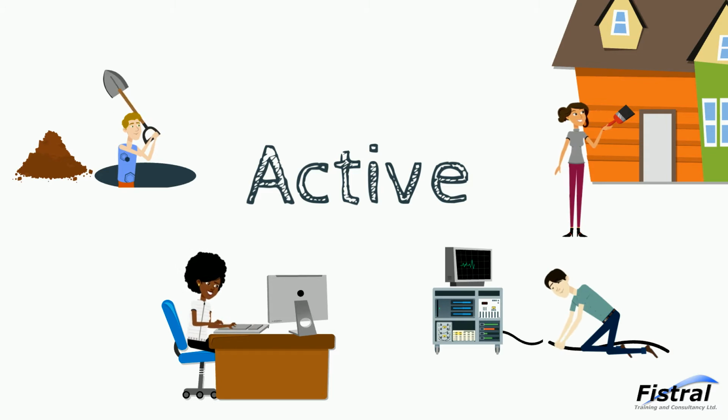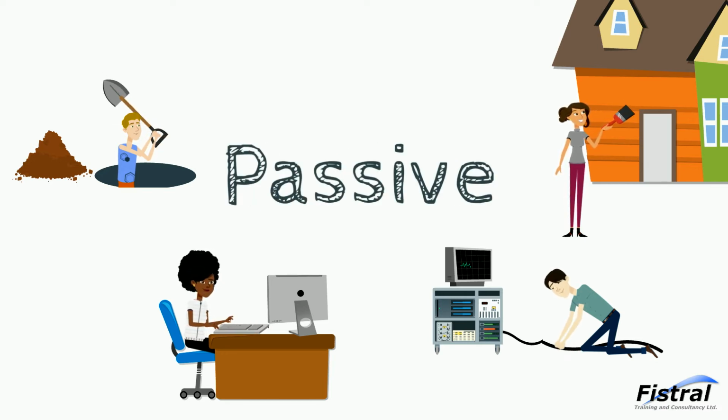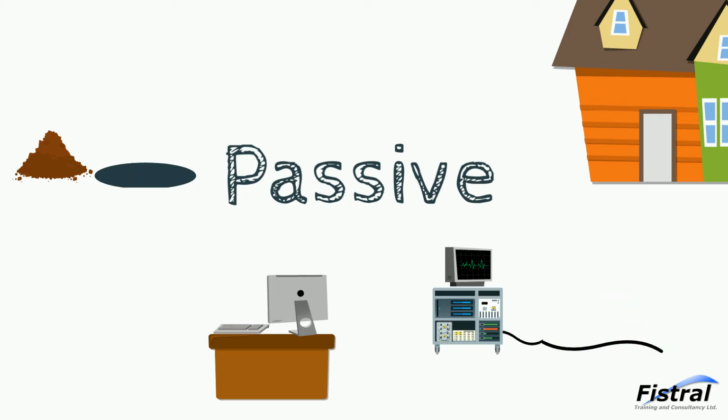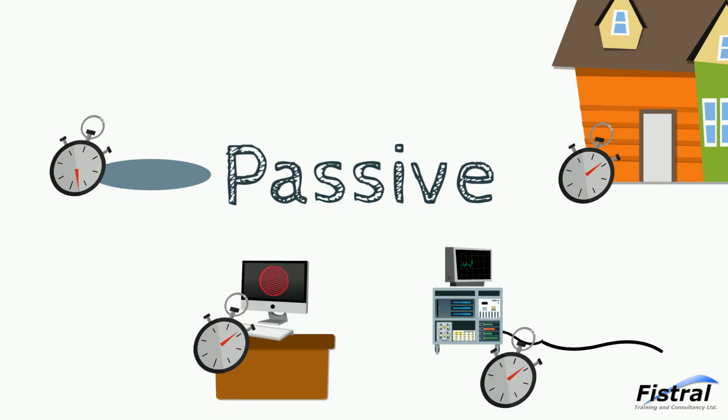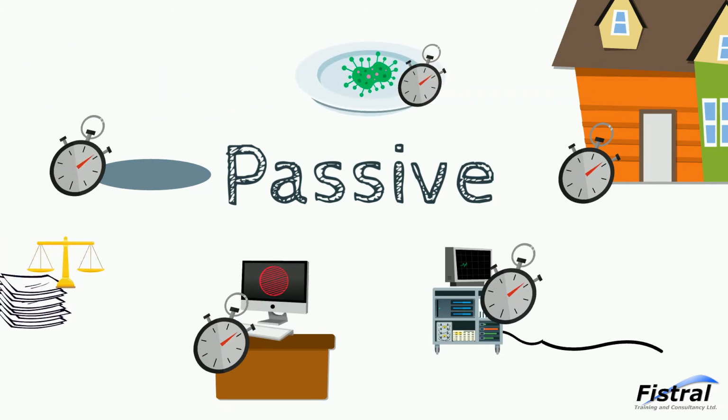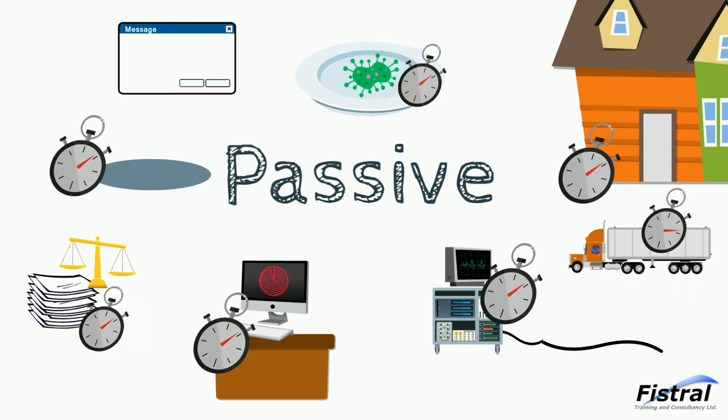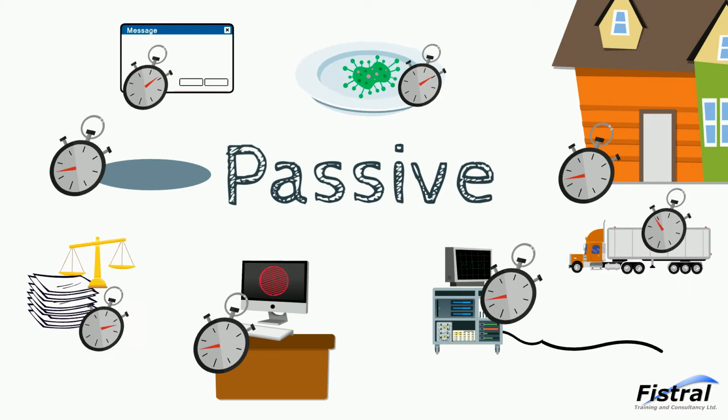And while we often find it easier to identify these types of tasks in the work breakdown structure, there is another type of task, no less important, that it's crucial we also identify: the passive or waiting tasks. These are tasks that normally require no human resource, but need to be in our plans nonetheless. For instance, waiting for paint to dry, waiting for concrete to set, or more likely, something like running simulations or modelling, cultivating cells, waiting for things to go through committee, lead times on deliveries, waiting for feedback. These are tasks that must be in our plan, otherwise our plan's wrong.